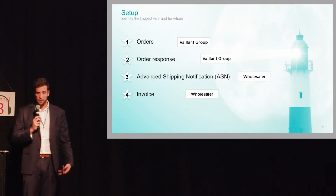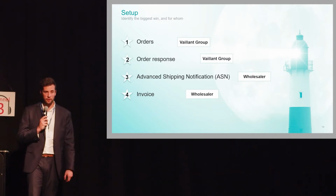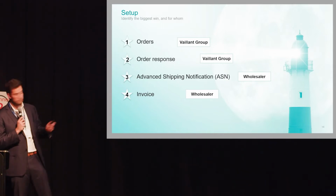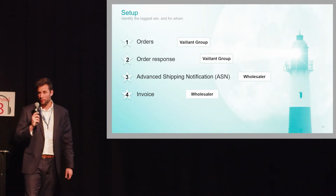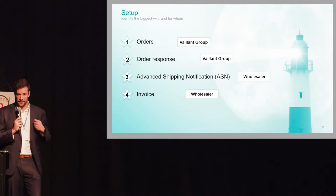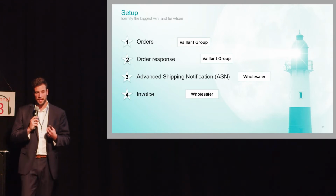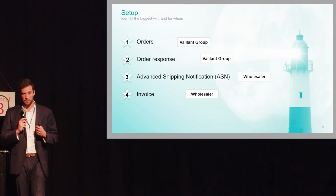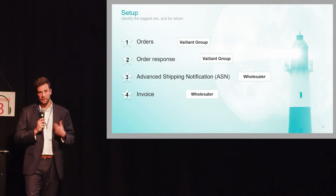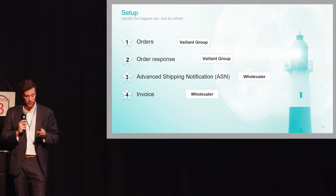We talked to SEEBURGER, and SEEBURGER said, okay, it's quite important before starting off, what are your priorities as Vaillant Group? And for us it was a normal question, and we know what it is. The big win is in orders and order responses. For us, all the rest is a side product. But in the end, the side product for us, the advanced shipping notification and the invoices, is the main win for our wholesalers. That's why we decided on a strategy where we want to implement order and order response as fast as possible, because there is the big win for Vaillant Group. But we will give the commitment to our customers that we will fully implement the advanced shipping notification as well as the invoices, because there is the big win for our wholesalers.